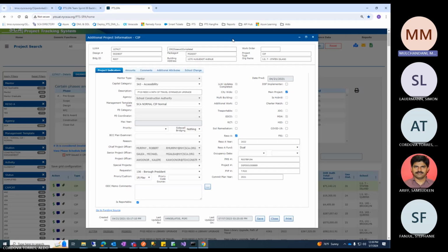It's basically the date the LLW update got completed. So that's the date that gets fed. The date gets updated, or the schedule gets updated, via PTS in this case instead of PPM. So there's a status change, and there's a date fed into PPM via PTS. So that's the end of pre-scope, which is ideally done by ODC, the department who handles it.